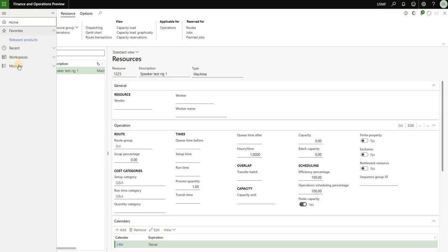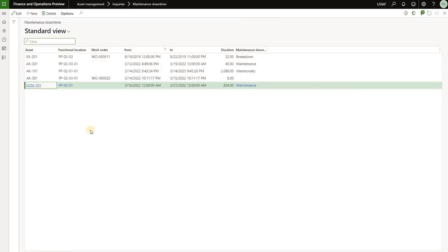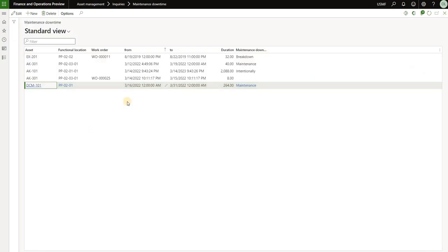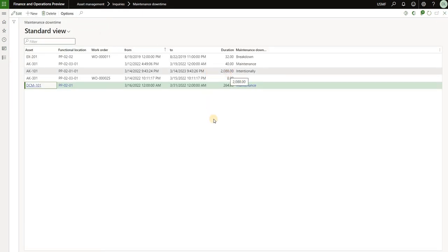The first thing we can try is downtime registration. We'll navigate to asset management, inquiries, and then maintenance downtime. Here I have created a maintenance downtime activity for asset DCM 101 — this asset is connected to resource 1225 — and this downtime record has a start date of 3.16 and goes up to March 31st, totaling 264 hours based on the calendar associated with the resource. Even though this record is there, the capacity reservation was not created. The conclusion is that creating a maintenance downtime for an asset connected to a resource will not generate any capacity reservations for that resource.